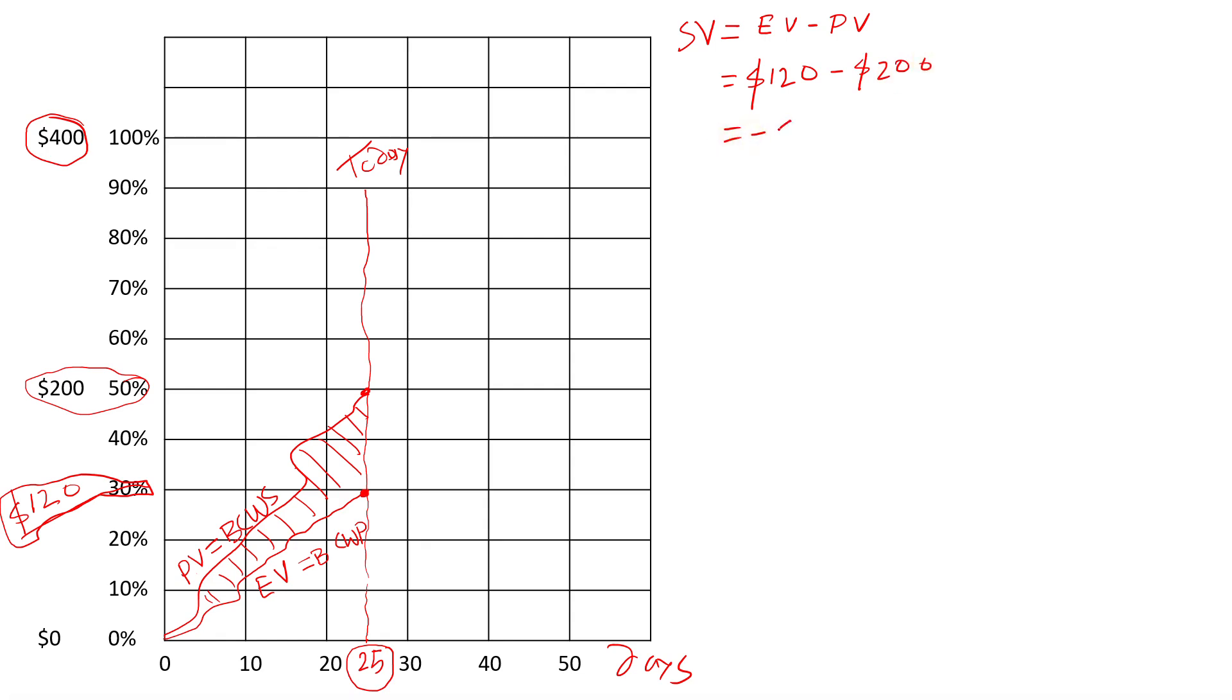We only accomplished $120 worth of value, but we're supposed to finish by now $200 worth of value. We are about negative $80. The dollar value is not that important here. What is important is that negative sign, which indicates that we are behind schedule. We're not doing so well in terms of finishing the project on time.